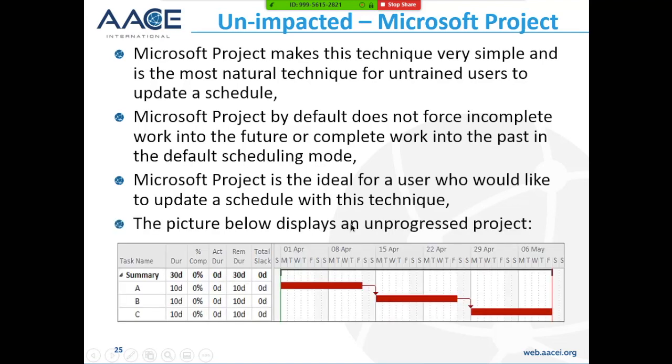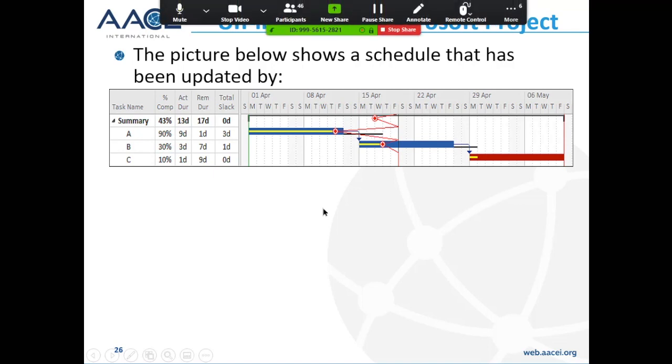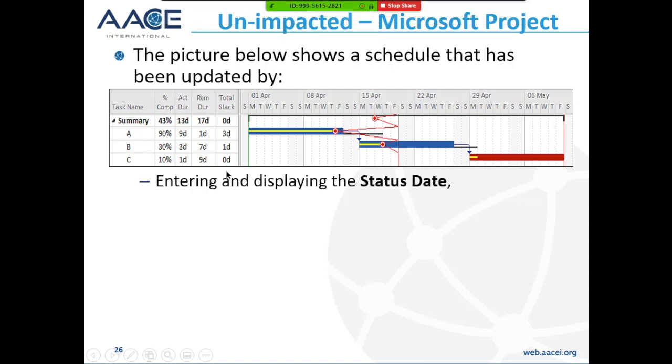So for example, this is the schedule before we've updated. Here's the summary bar, and we've got 3 activities. So all you do is you put in the percent complete. You can show the progress line if you want, and this clearly shows that this is behind, but Microsoft Project doesn't show that this is ahead of time. It's just the nature of the way the software works. So it's very, very simple. You put the percent complete column in, and if you go...